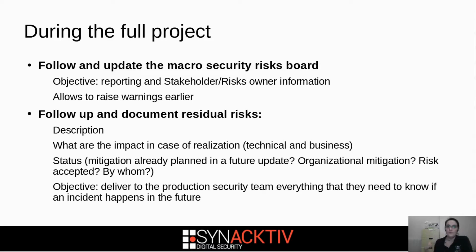Okay, you should again follow and document all residual risk that you identified. So whether it's a gap in the development between your requirement and the actual solution, or maybe something we found during pen test, I don't know. So you should document what the risk is, what the impacts are in case of realization. Is it mitigated, maybe by an organizational measure, I don't know? Is it accepted? If yes, who accepted this risk? The idea again is to be able for other teams to follow the security of the product during its life.